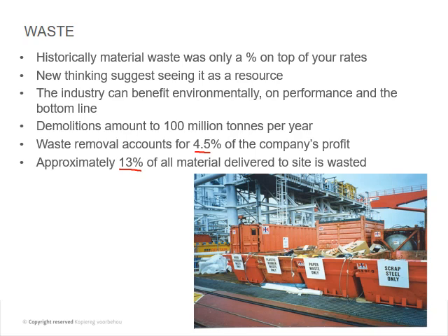The other thing is if you plan your site such that you use some of the original constructed building as storage, you can save that cost as well. So there's a whole lot of practical ways to save money by utilizing your progress on site and just being effective.